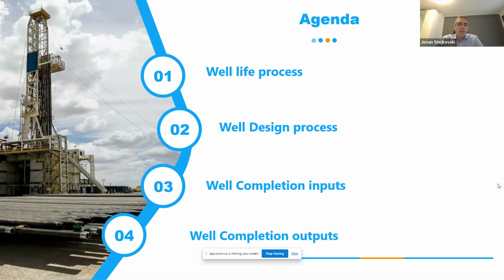What are the documents and simulations and things which he needs to deliver during the process of, let's say, the well design. We know that the well design process in many companies is pretty much similar. We go through gate processes where, from the beginning to before the execution phase, we need to design our completion fit for purpose, which needs to be technically and economically approved. After that we will have a green light to order the equipment, execute and complete the well, and produce in the end.